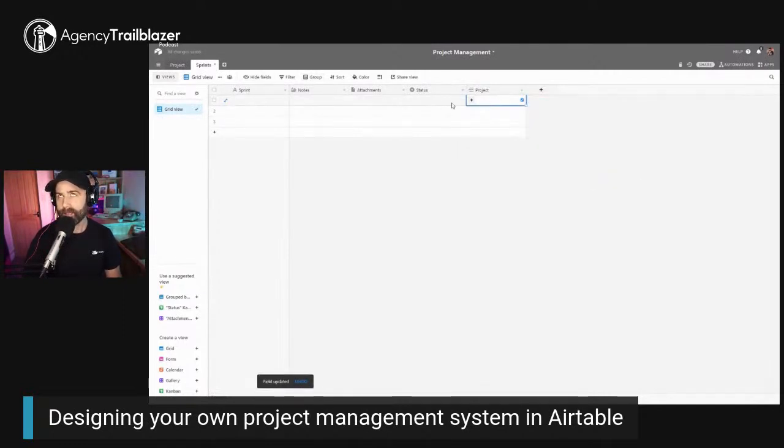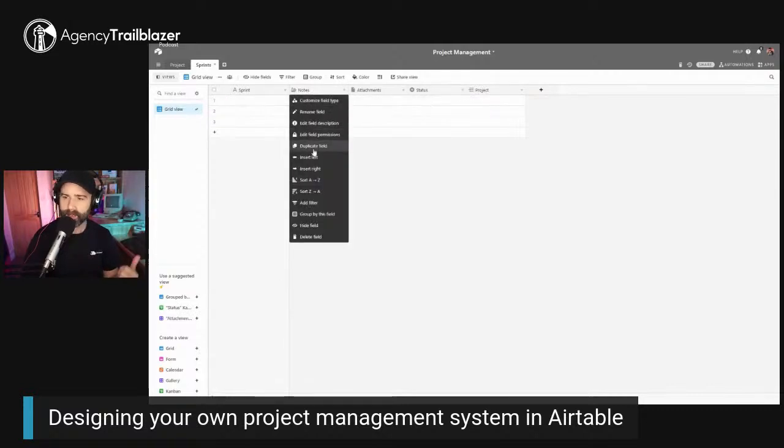Then let's add in a dependency as well. A dependency from a sprint is important because if we do sprint 1, sprint 2 can only begin when sprint 1 is completed. It's kind of like milestones, etc. as well. So what we'll do here is we're going to add another field in.